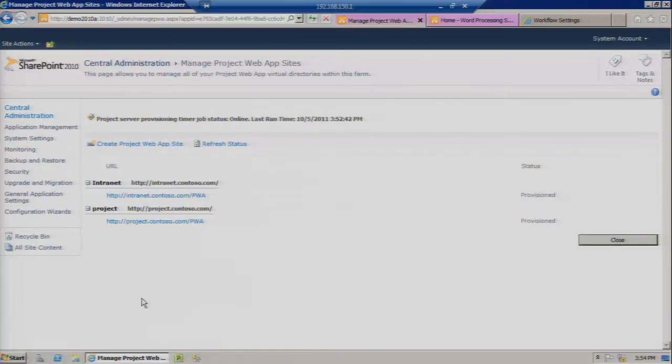And maybe I want to put them in Project Server because I need to do that resource modeling, capacity planning. Do I need to hire? Do I need to fire? Or is Christoph understaffed and maybe should get trained or something, so I really get 100% utilization? So the question I was telling this customer is, probably your R&D department is going to have very different methodologies. And maybe they don't care what all the researchers are doing every day, versus in IT, you do care. Are you using everyone to their capacity?